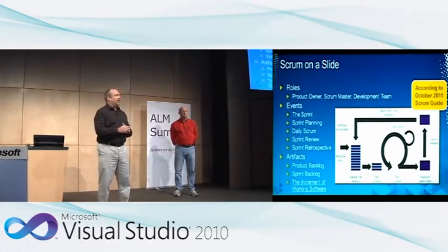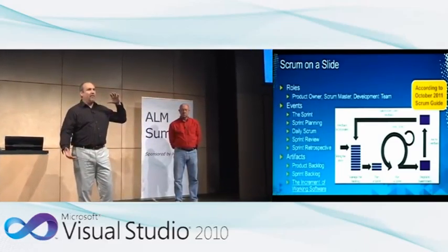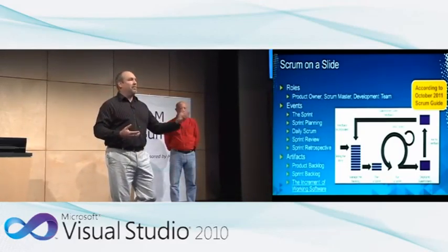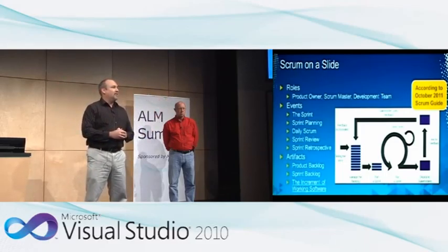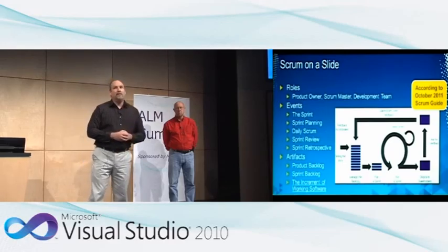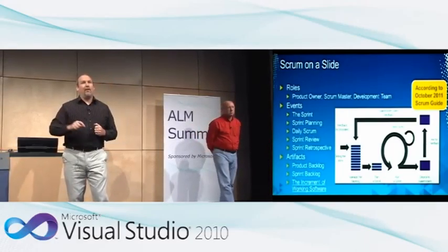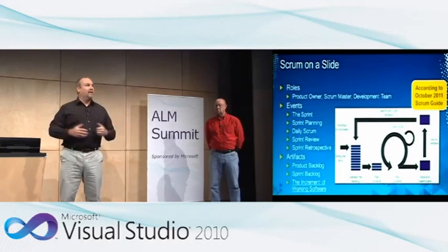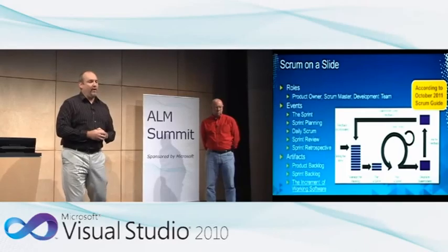And then I took Microsoft's process diagram here, because essentially we take a large backlog of everything we want the product to do that it doesn't do currently, whether it's a bug to be fixed or a new feature to be implemented or a really big idea like an epic. And that goes into a list that we prioritize by business value, ROI, and we order it. The team then forecasts what they can do in the sprint into a smaller backlog called the sprint backlog, and then they build their plan on top of that. And in TFS, the plan is usually task work items. So I'm going to go through that motion for you and show how these new web-based tools really help you.